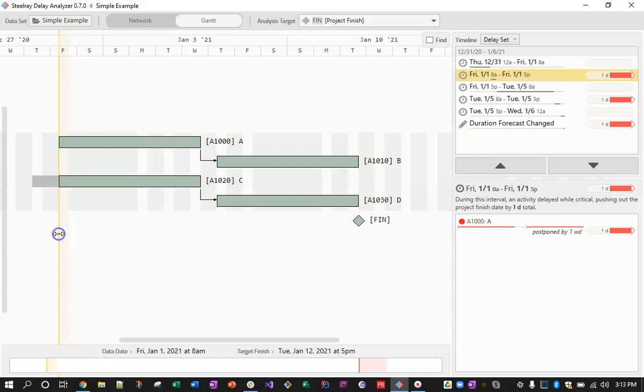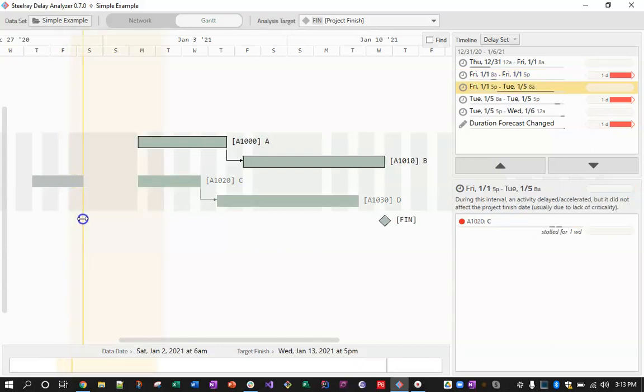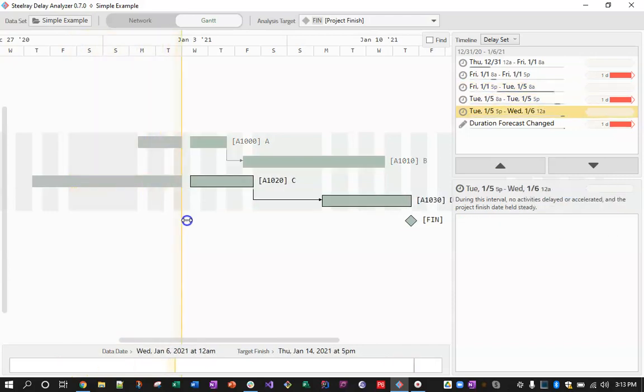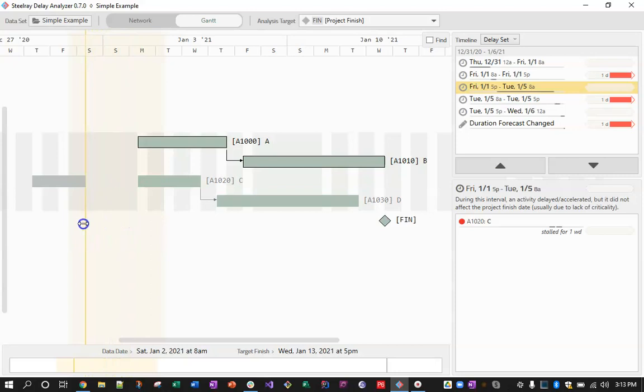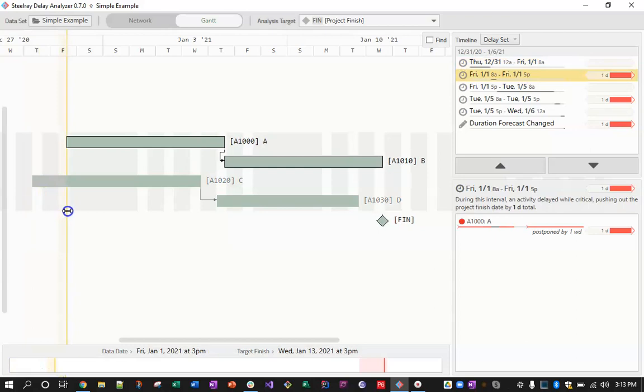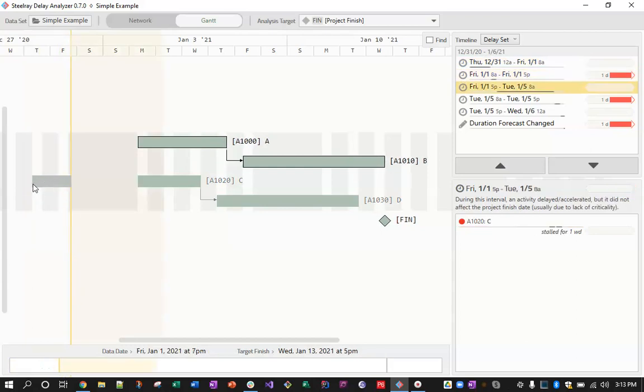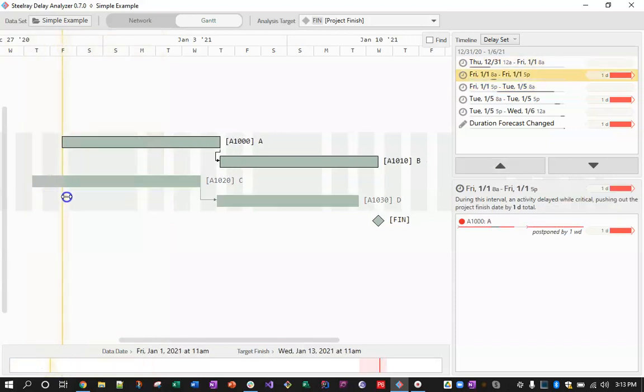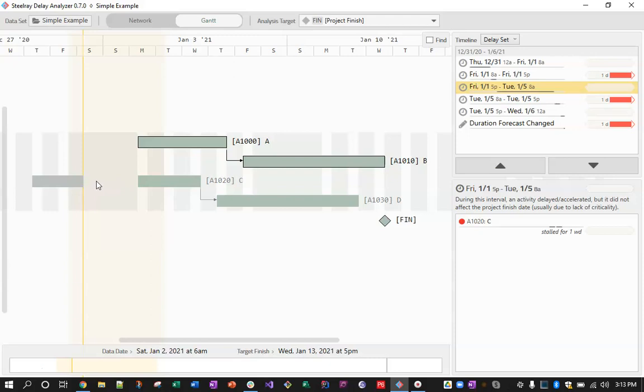And when I'm dragging it to the right, I'm going to have you look here for a second. When I drag to the right, what I'm doing is navigating through. But you can also see some movement here in the Gantt chart. So what is going on? As I move to the right, this gray is showing completed time. And you saw C kind of do a jump, right? Because there is no progress over the weekend, over the non-working time. So that's why when I drag left and right, nothing is happening to C's finish date.